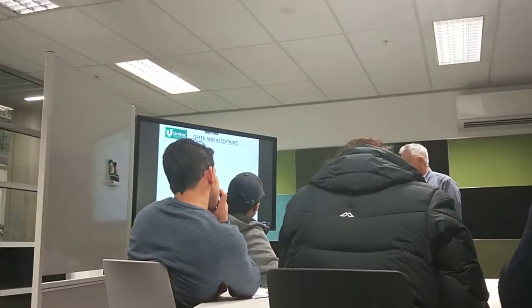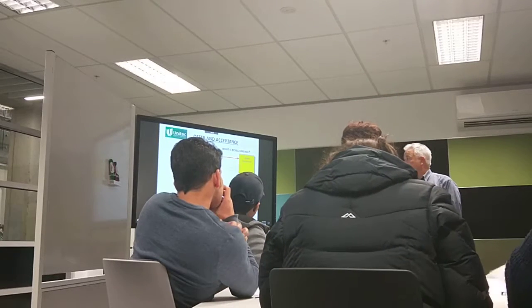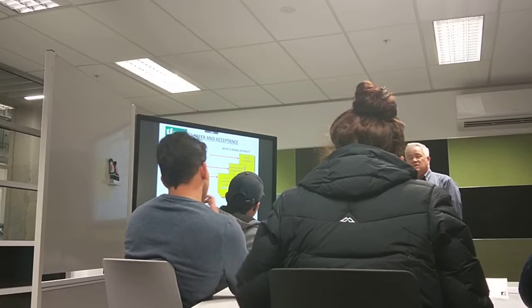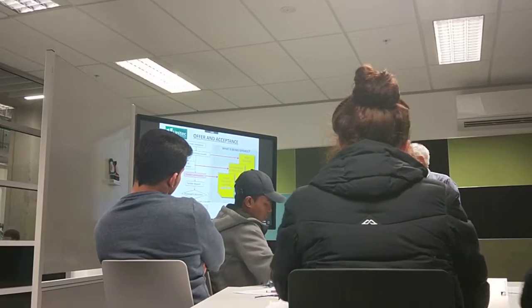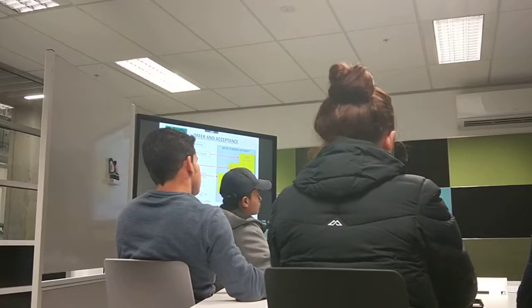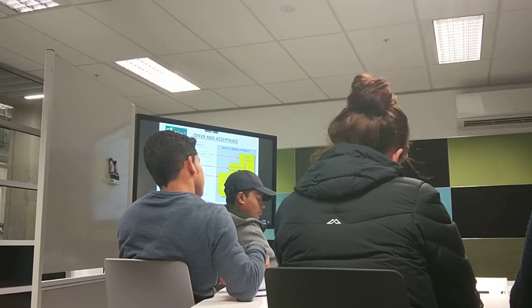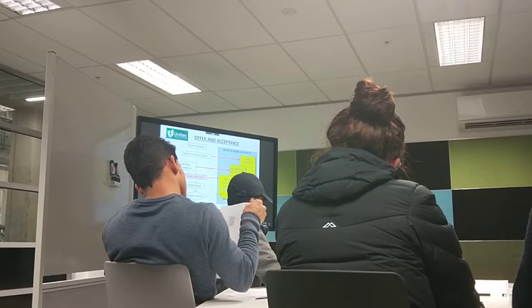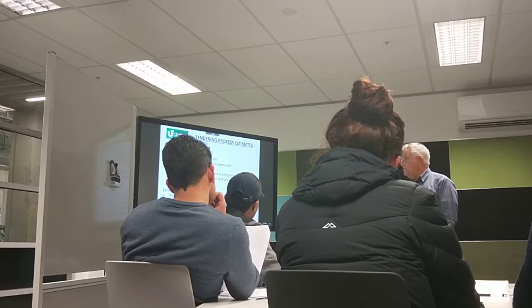So how do we make these things? Remember, the tender submission is the offer. What they're offering is what's in the tender document, what's communicated, but most importantly, what was in their tender submission, including the tender price. And you can't go to the client afterwards and say, oh, we made a markup when we were doing a tender price. It was really $1.2 million we should have put in, we only put in $1 million, can we change it? No. Okay? So it's important to get it right. Offer and acceptance contract form.